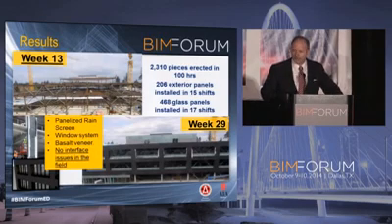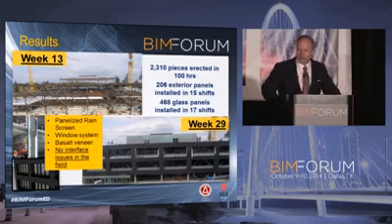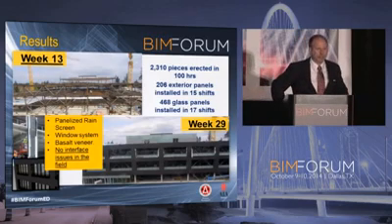By week 29, 206 exterior panels installed in 15 shifts, done off-site. This is in the winter in Seattle. It rains. All the waterproofing was already installed on the panel. You can see that they got to the point of just peeling it back. When we free them up, they get very creative on things to do. 468 glass panels installed in 17 shifts.